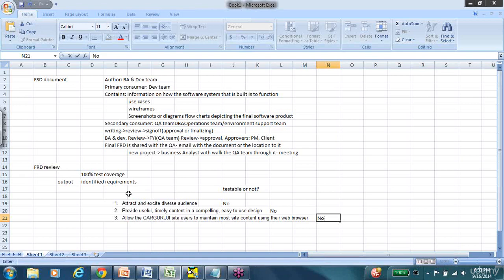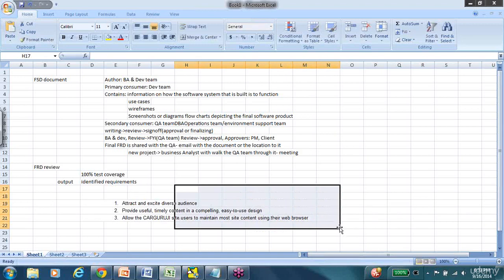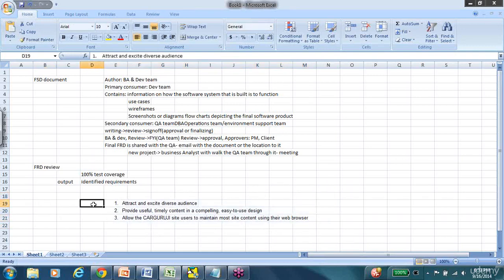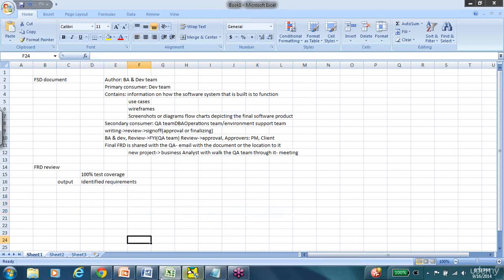So this is something we can keep in the back of our mind and look for while testing based on your judgment, but this is not something that we can test and give a pass or fail, yes or no criteria. So these business requirements fail the feasibility analysis, which means that they are not going to be a part of the requirements that we are going to test for. So we are not going to consider them.